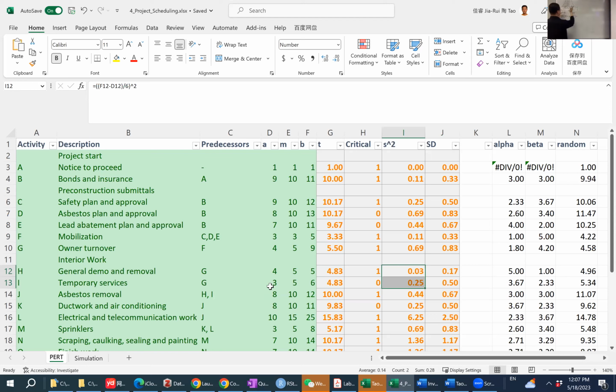First, we calculate the probability that the activity is done within 95 days. So we calculate the left side of the right reference line. Then we are going to remove this shaded area to the left, that's shaded by the tilted lines. So that means we calculate this quantity by doing this.